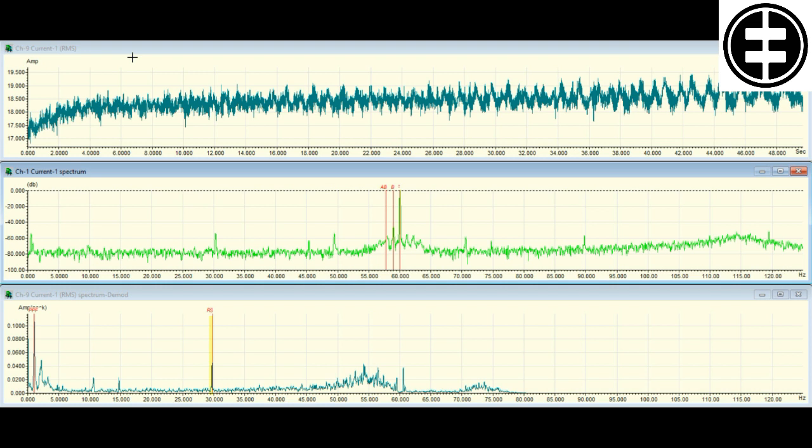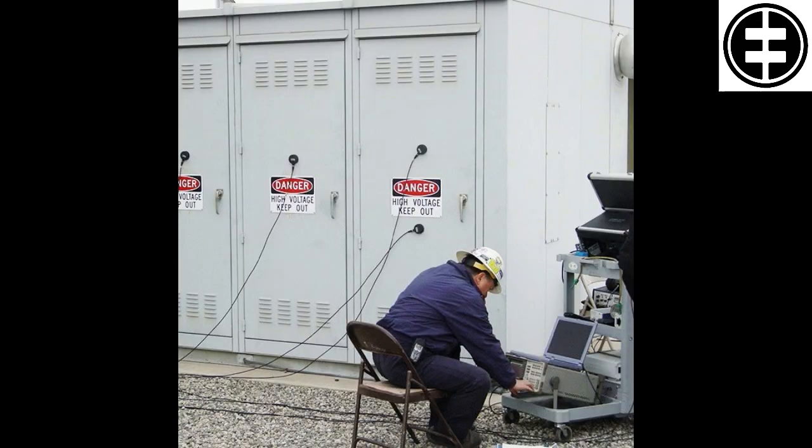This is due to the different environmental conditions, noise level, and measuring and calibration equipment on site. Measuring PD alone does not provide enough information on the condition of the motor or generator, and visual inspections and other evaluations also need to be done.